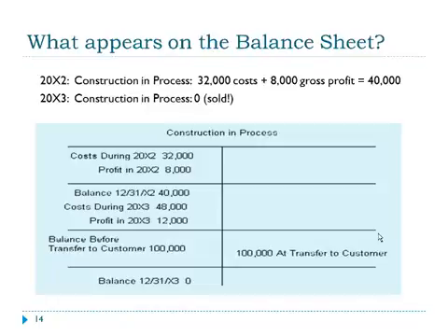Then when the profit is accrued, it increases construction in process, so that the balance at the end of 2002 is $40,000. The costs in the next year are $48,000. That gets added in, and then we add in the gross profit from 2003, which is $12,000. So at the end of 2003, the balance in this account is $100,000, exactly equal to the contract price.